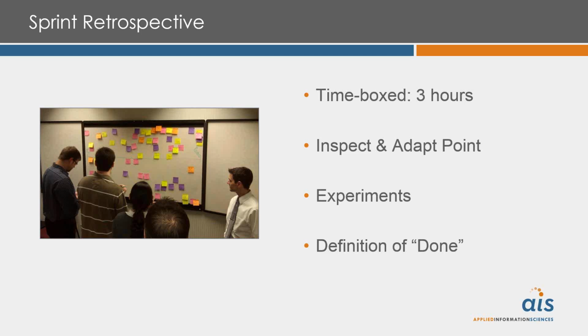At all times, we want to look at what we call the definition of done. Now, I mentioned early on that our objective from each sprint is to produce done software. Well, we should make that clear. What does that mean? When we get into the sprint review, we want to tell everybody, here's what we've done. Here's how we've produced this. Here's how we're sustaining agility. All right? They should understand that this has been code reviewed. We've run static analysis on the code. This has been tested by a certain number of type of user. We've run through these load tests. We've had the copy reviewed. It's available in 3 languages. We want to have an explicit, clear definition of done that everyone understands throughout the organization so they know what they're really getting. This is a part of that transparency thing.